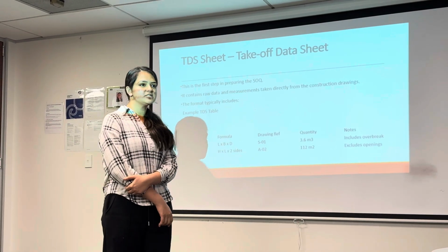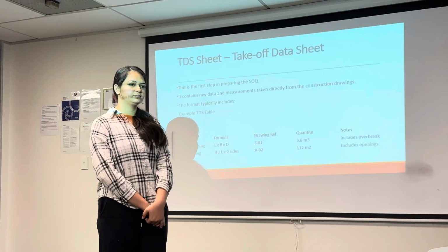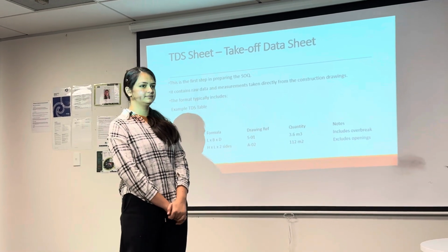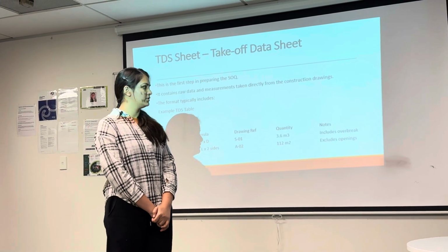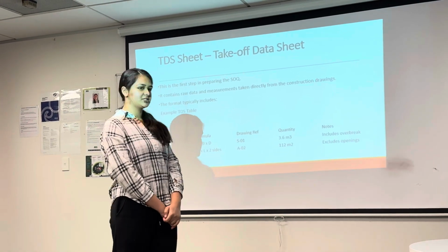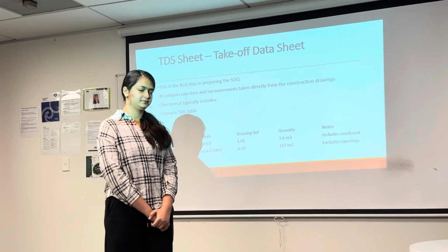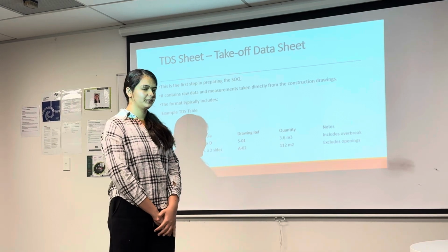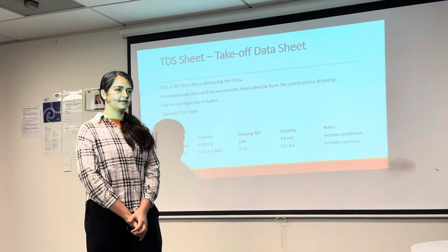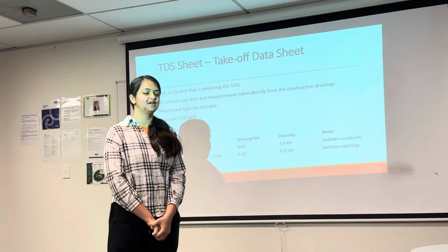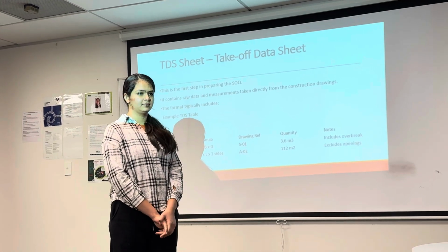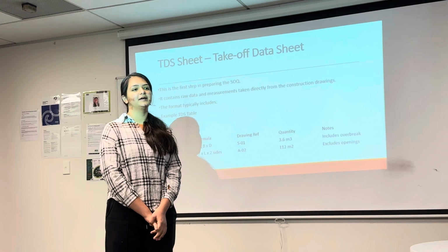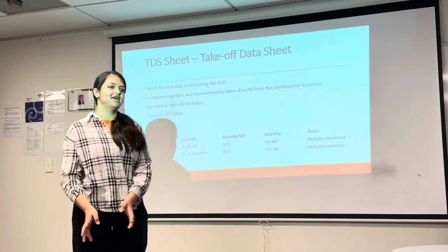Applying the formulas. Before that, you have to refer to the drawing. Then you have to understand the unit of measurement. What is the unit of measurement of the site clearance? Meter cube and meter square. It is square meter, right? Keep in mind, it's meter square. First thing is you have to refer to the drawing. Then you have to identify the units of measurement. Then you have to calculate the measurements, length and width. Then calculate the quantity, the area, and after that you can do it.